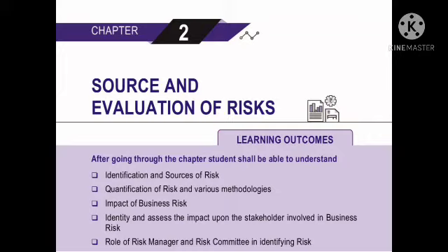The severity of the risk is a practical measure for quantifying risks that indicates the extent of harm a risk can cause. Generally, during a risk assessment exercise, a risk probability and impact matrix is prepared where the levels of risk severity are depicted through a color scheme of red, green, and yellow, where red is the most severe or critical risk condition. This is also called the traffic signal risk card. Risk assessment is a method of analyzing the significance and priority of a risk. Under the qualitative analysis, all the identified risks are plotted on a matrix.